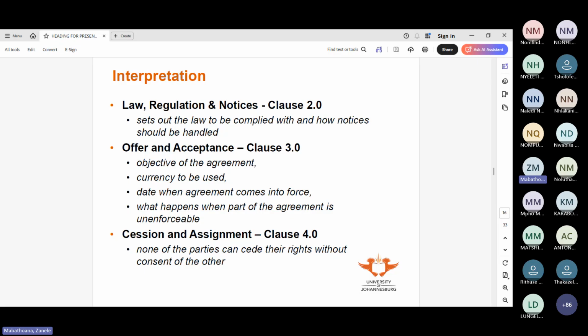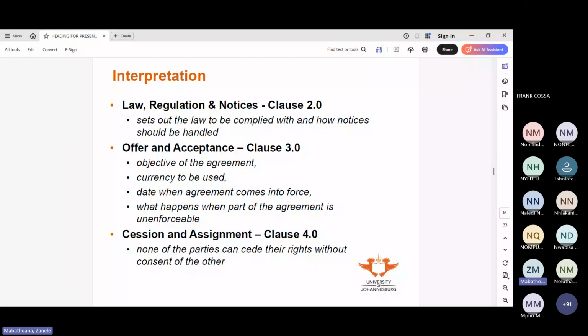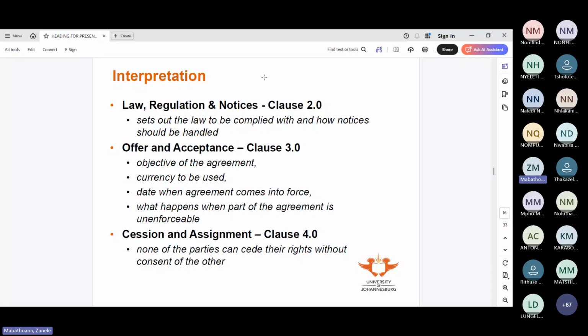Generally, with some contracts, people change this clause to say electronic mail within 2 days, so that they give themselves time, because you sometimes find that you're very busy. Then you have registered post, which we no longer have in South Africa. The post office shut down. We now renew our licenses there, at the few offices that are still open, but registered post would be within 7 calendar days. Calendar days would include Saturday and Sunday, whereas working days would be your Monday to Friday, okay?